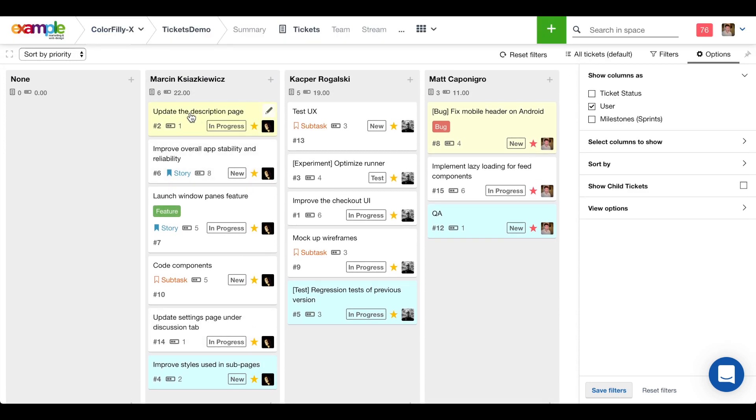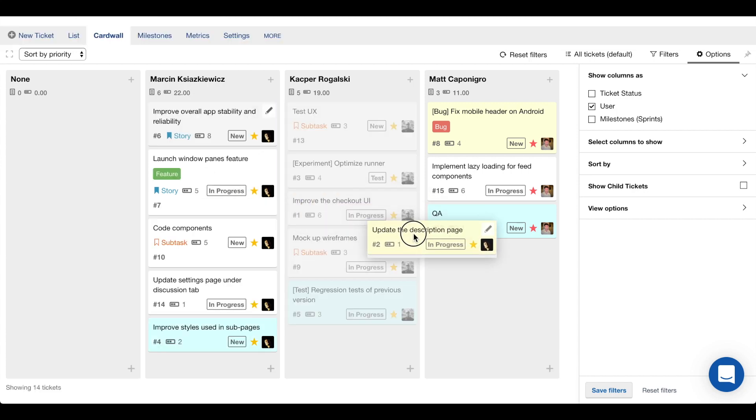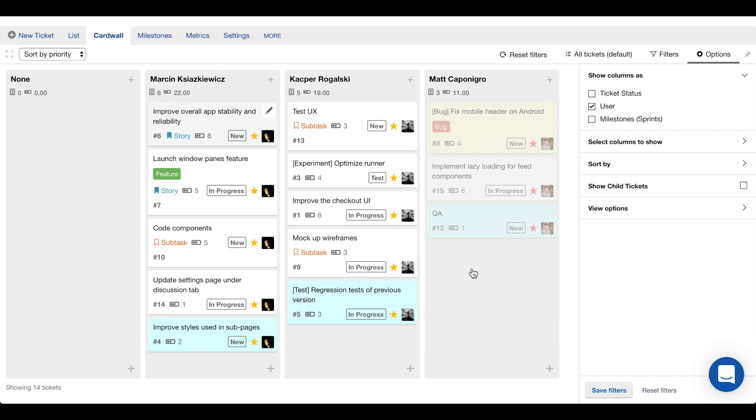Update the description page. That doesn't look like it's going to take a lot of work. It's only estimated to be one story point. So I'm going to go ahead and move that over to me as well.